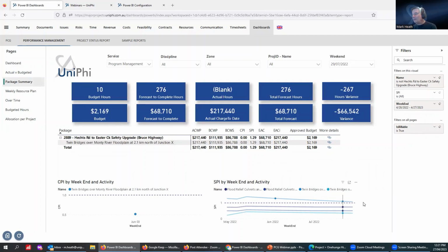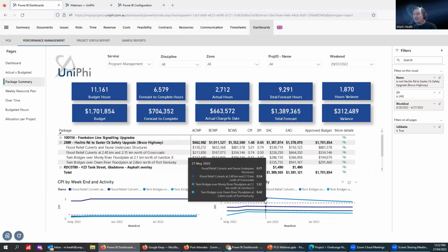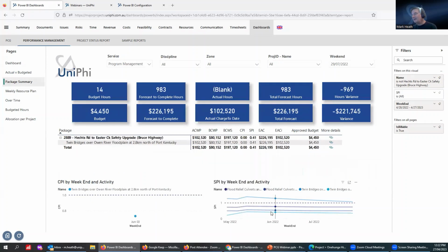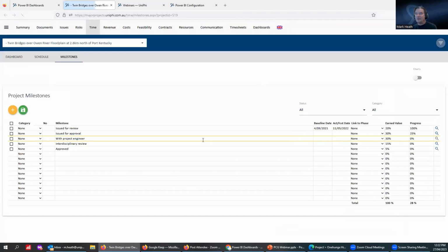And you can see the one is good in earned value. Above one is exceptional, below one is poor performing. And so from a schedule perspective, this particular activity is doing okay, but from cost, it's zero for some data quality issue. And then you click on the link again and again, it comes back. So those sorts of trends are there for you to see outliers, see things that you might need to drill in on. And as mentioned before, if it's designed well, you should be able to then get into the system quite quickly and see what is the milestone that hasn't been improved yet, what was its baseline and forecast, and where is it at, and what's the progress status.